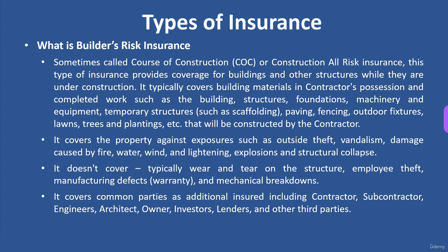It covers property against exposures such as outside theft, vandalism, damage caused by fire, water, wind, and lightning, and also explosions or structural collapse. It doesn't cover typical wear and tear on the structure, employee theft, or manufacturing defects, as well as mechanical breakdowns. So obviously, if the contractor's crane or excavator breaks down and they can't complete a section of work, or it's down for an extended period of time, it's not covered under builder's risk. That's the contractor's responsibility. It also doesn't take into effect wear and tear on things while the building's being